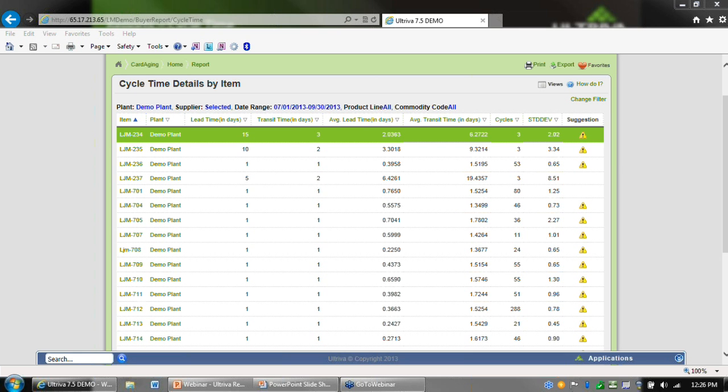Because if you really see any supplier, even in this particular sample, the supplier says 15 days is my lead time. When you really look at it, 85% of their time goes for planning, and 15% of the time is the actual manufacturing time. So typically, the suppliers will always give longer lead time.